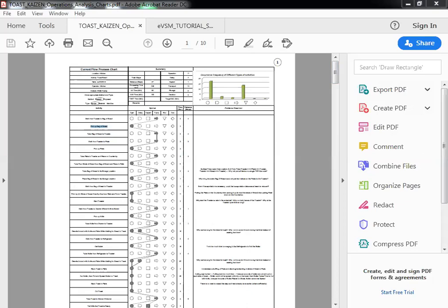So step number 2, pick up bag of bread, connects the bread and the worker. That's why you'll see step number 2 is shown on the timeline for the worker and the timeline for the bread. That's basically the idea of the Gantt chart.